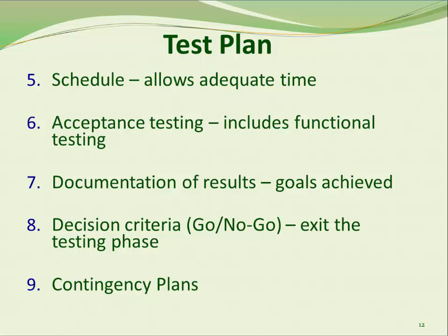And finally, a contingency plan component should be included which identifies alternative strategies to be used if specific risk events occur, such as failure of test results to support a decision to proceed to the next phase of the project. Examples of contingency strategies include alternative schedule activities, staffing plans, and emergency responses to reduce the impact of risk events.